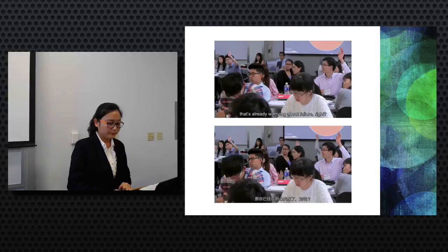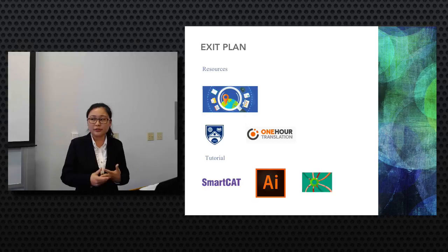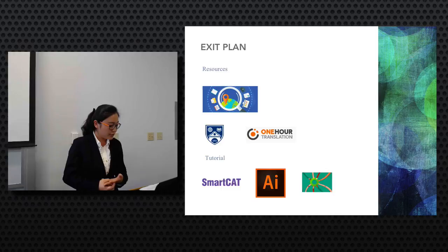And now that we have wrapped up, it's time for us to hand off the project to our client, in the hope that our client could continue their localization process in future projects. We provide our clients with some resources and tutorials for them to leverage in the future. First, we handed over the linguistic assets along with TM, TD, source files, target files in corresponding languages, style guides, as well as all the updated linguistic prep files and tag prep files, things that they can leverage.